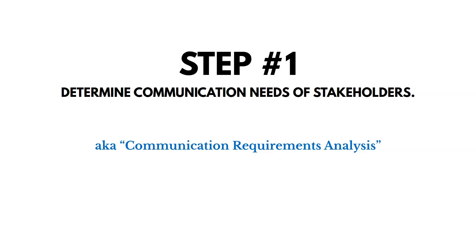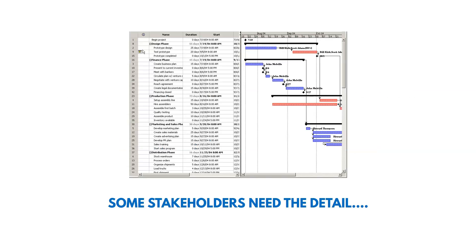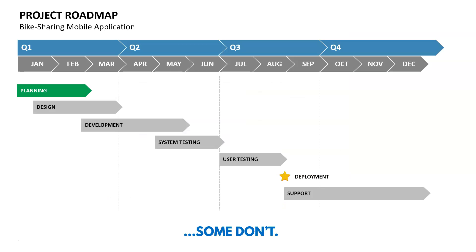Now let's talk about planning communications. The first step is to determine the communication needs of our stakeholders, and we call this communication requirements analysis. We're documenting the requirements of our stakeholders: what information do they need, when do they need it, who should send it, and so on. Some stakeholders need detail, like a detailed Microsoft Project schedule, but others may just want a high-level roadmap by month and don't need to see every activity every day.